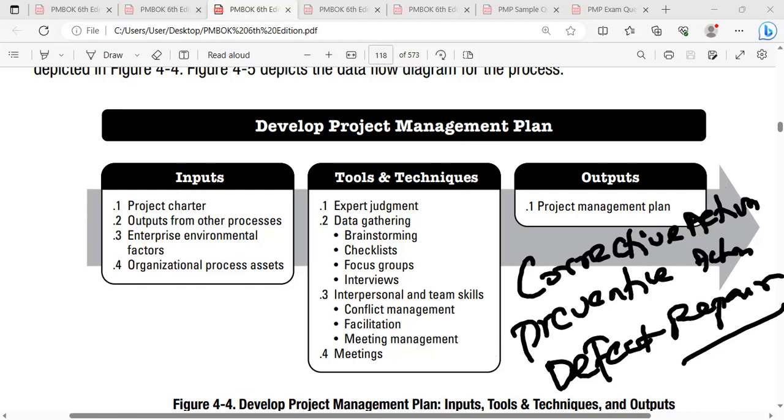Any change request, any recommendation, if you work for any project, whether you work for a groundbreaking delivery project, a state-of-the-art kind of project, or you're going to create the first version of its kind, you need to recommend either corrective, preventive, or defect repair. So scope related, only these three change requests. Either one change request, depending upon the situation, you need to send us a recommendation. So what do you mean by corrective actions?